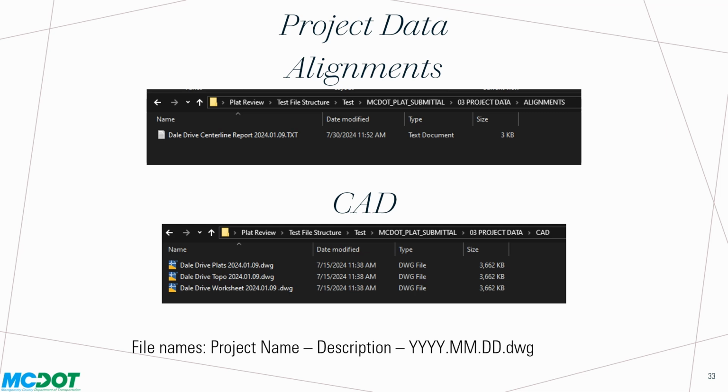All files should have the required naming structure for easy identification of later revisions replacing older versions. It is important that subsequent editions of any revised file share the same name except for the appended revision date. This allows for quick substitution of updated files during the review process.